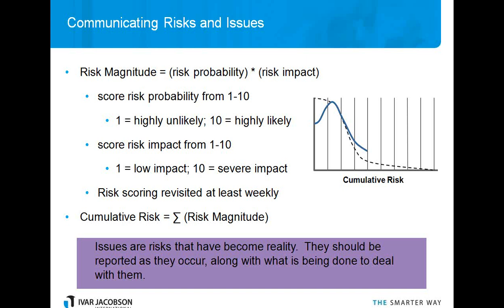The reason this is important for the project sponsor is to give them a sense that, in addition to having good progress on the project, as we looked at on the prior slide, you're dealing with issues that would later on derail the project, and therefore you're more confident of your estimates and progress over time. This also gives you some visibility into problem areas that might be coming up. Issues are risks that have become reality, and of course issues might need the involvement of the project sponsor to help clear them out. So it's important for them to know about that. Next slide, please.